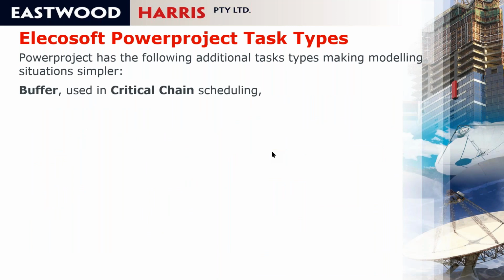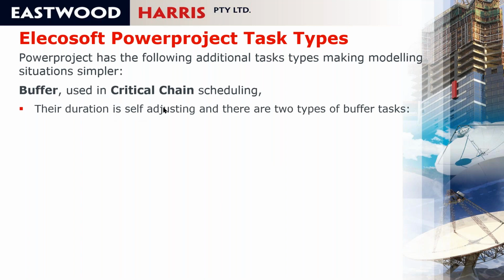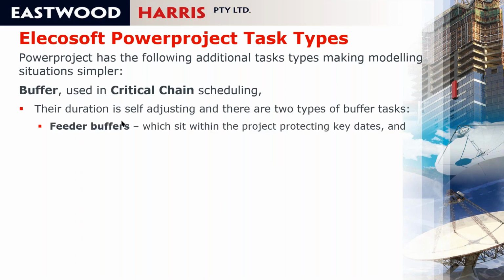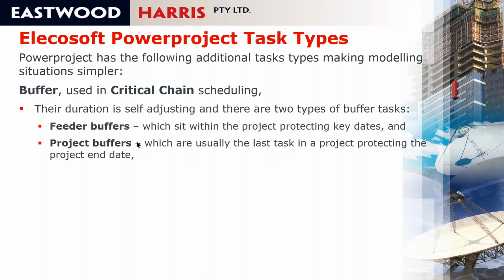So if you've read Eli Goldratt's book on critical chain scheduling, Elecosoft Powerproject supports buffer tasks, and the duration is self-adjusting. There are two types of buffer tasks. There are feeder buffers and project buffers. Have a read of his book. It's really interesting, but again, Powerproject supports critical chain scheduling.